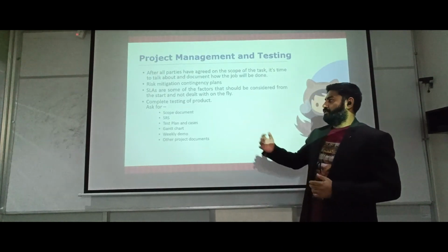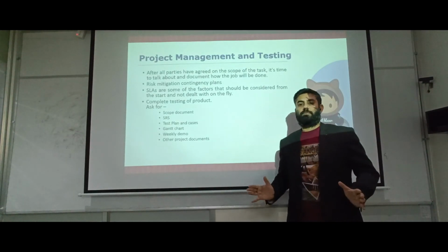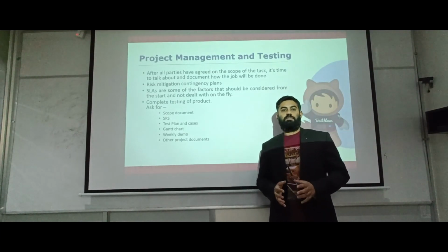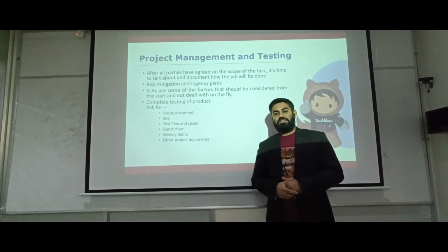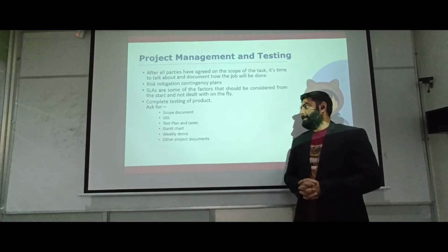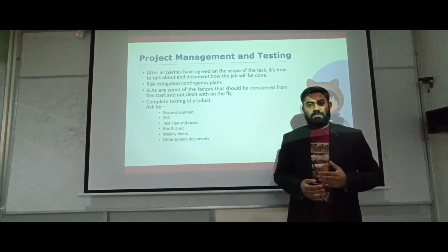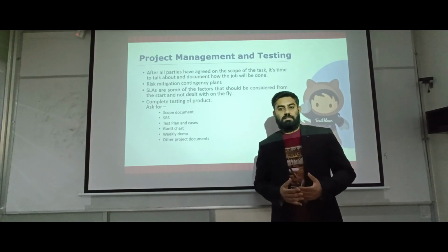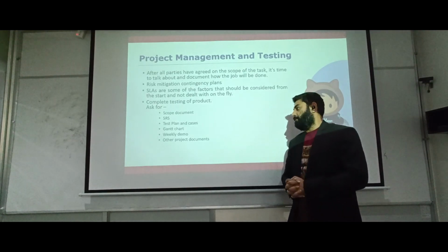You can ask for documents like a scope document, which will define the complete scope of the project. SRS, the system requirement specification, which will tell you in depth what the project is all about. Test plan and cases, showing how they will test your project. A Gantt chart, which will give you delivery timelines and milestones. And weekly demos: if you are giving them a project, you might want to see the progress weekly rather than waiting till the end and giving feedback later on.